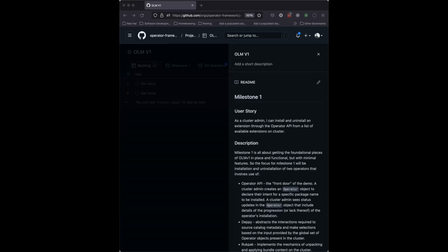I almost think of it like constant refinement and Kanban-y style of stuff, where we get together, we look at what's on the milestone. It's not really a stand-up, but what's on the milestone, what's in progress, what did we close, what are we going to do next? Let's quickly type out the next title of the thing that we're going to do, and just keep things chugging along. And I feel like it might be good to have two separate venues for that because you want to make sure that you have time for both.